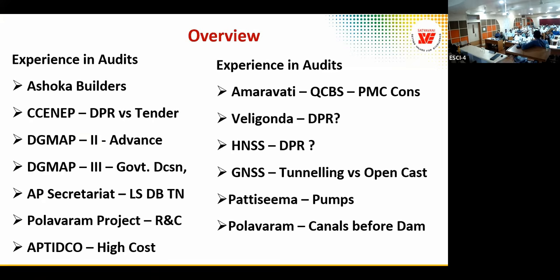That is one example. Another example was Indian School of Business, the ISB. The project was initially estimated at $40 million at that time. And the time period, fast track project. So because it was a fast track project, they appointed a project management consultant, W.S. Atkins, and they had given powers to issue Project Manager Instruction, PMI. And they did the project. The project ended up at $55 million.